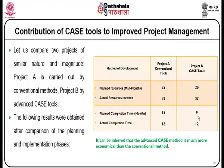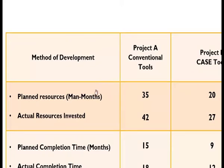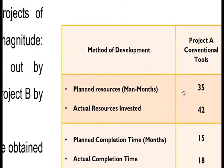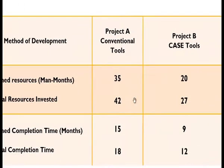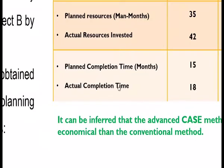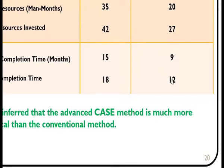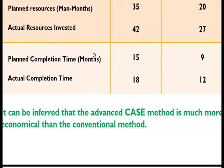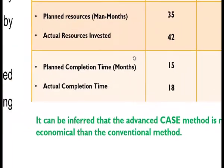Contribution of case tools to improve software project management. Comparing two projects of similar nature and magnitude: Project A using conventional methods, Project B using advanced case tools. Planned resources in man-months: Project A — 35, Project B — 20. Actual resources invested: Project A — 42, Project B — 27. Planned completion time in months: Project A — 15, Project B — 12. It can be inferred that using case tools is much more economical than conventional methods.